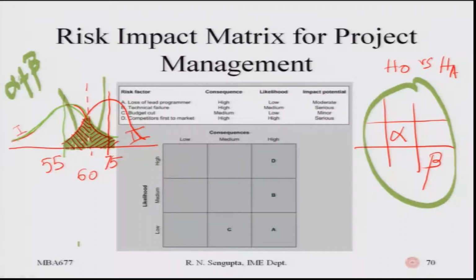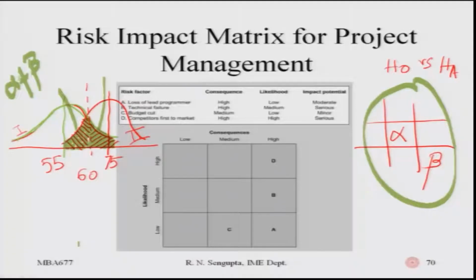So, there is an average time period of 90. Obviously, you can either exceed or you can finish the work much before 90. So, if these probabilities are given, what are the consequences? Consequences we will try to understand from the point of view of the budget being exceeded, the amount of materials being used much more, whether there would be any technical difficulties, or whether you are trying to use different types of resources like man, machine, and so forth. All these consequences would be drawn on this table, considering the overall project is in front of you. Obviously, you can break this table into more macro levels for each and every activity which makes up the overall project.